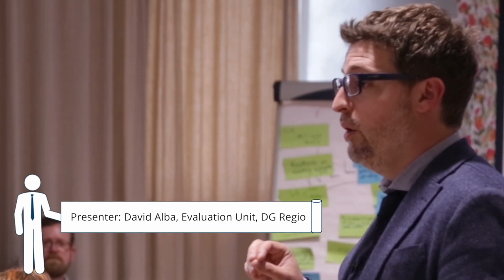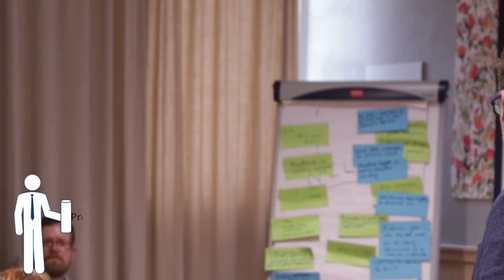And these objectives should be limited, so there should not be too many. One or two, maybe three objectives where you say, basically, this is what I want to achieve overall with my evaluation. And these are not yet the evaluation questions. This is really what I want to achieve by doing this evaluation.